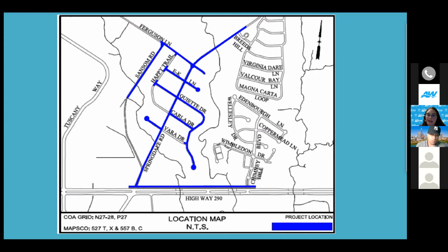Then Lori is asking, what is the date the project will start? What date are we expecting to start in November? I'm not sure if we're able to give a specific date tonight. If you have an estimate, maybe we could give a range. And again, we would be sending an email out the week before construction is starting. Demira or George, do we have an estimate that we want to give? The anticipated time frame would be the end of November, first or second week of December, just getting through a lot of the official paperwork and things of that sort in order to get kicked off.